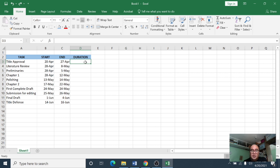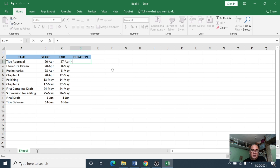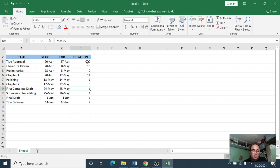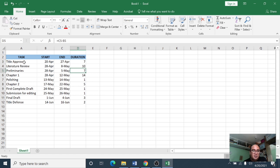To complete the table and compute the duration, we simply subtract the start date from the end date. We key in the formula equals C3 minus B3. Hitting enter gives us 7, and then we copy this formula down. This gives you the duration for each task in days. For example, title approval has seven days and literature review has ten days, and so on.